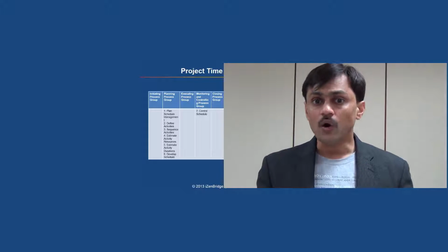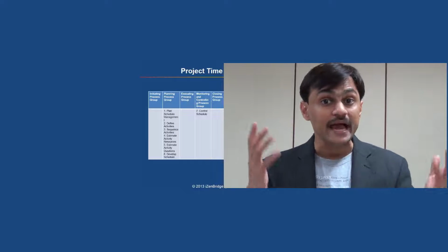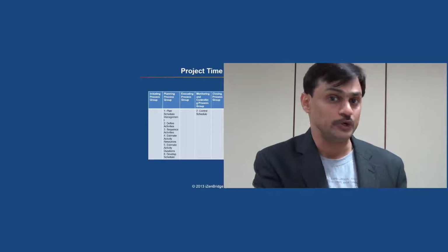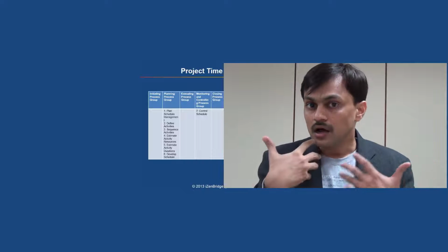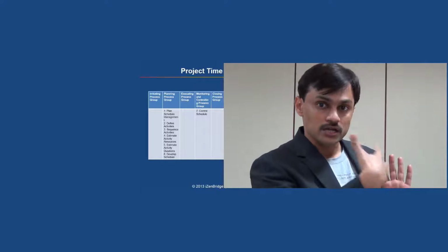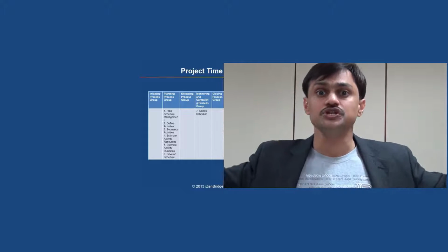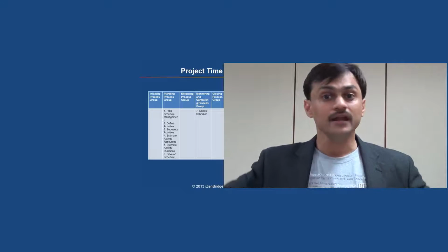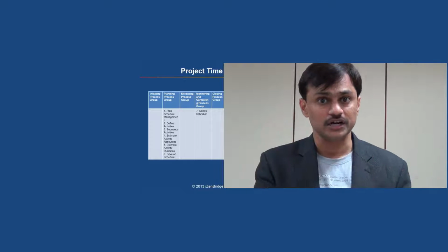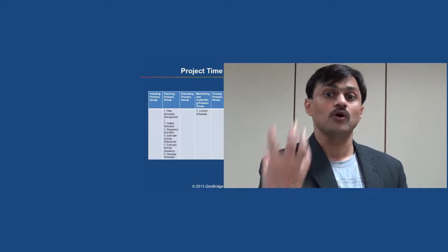After that, you need to identify what all resources you need in order to perform that activity, maybe human resources, but also engineering resources or other resources. After identifying the resources, you also need to estimate how much time an individual activity is going to take given the resources, given the other scope of work defined. Now, after that, you have a collection of activities which are sequenced and have duration and resource estimation attached. Now we need to bind all these things together, and we need to prepare a complete schedule which gives us project end dates. Binding these activities in one logical network diagram and identifying their early starts and early finishes is all about a process called develop schedule. Now this is the final process of the planning process group of the time management knowledge area.